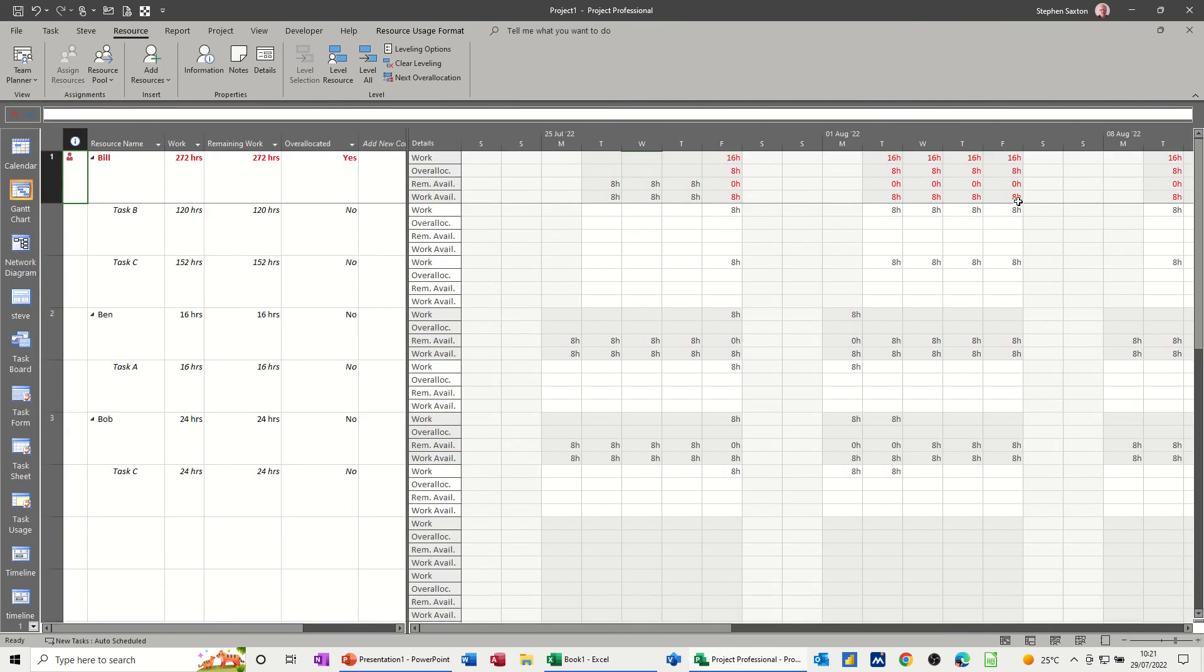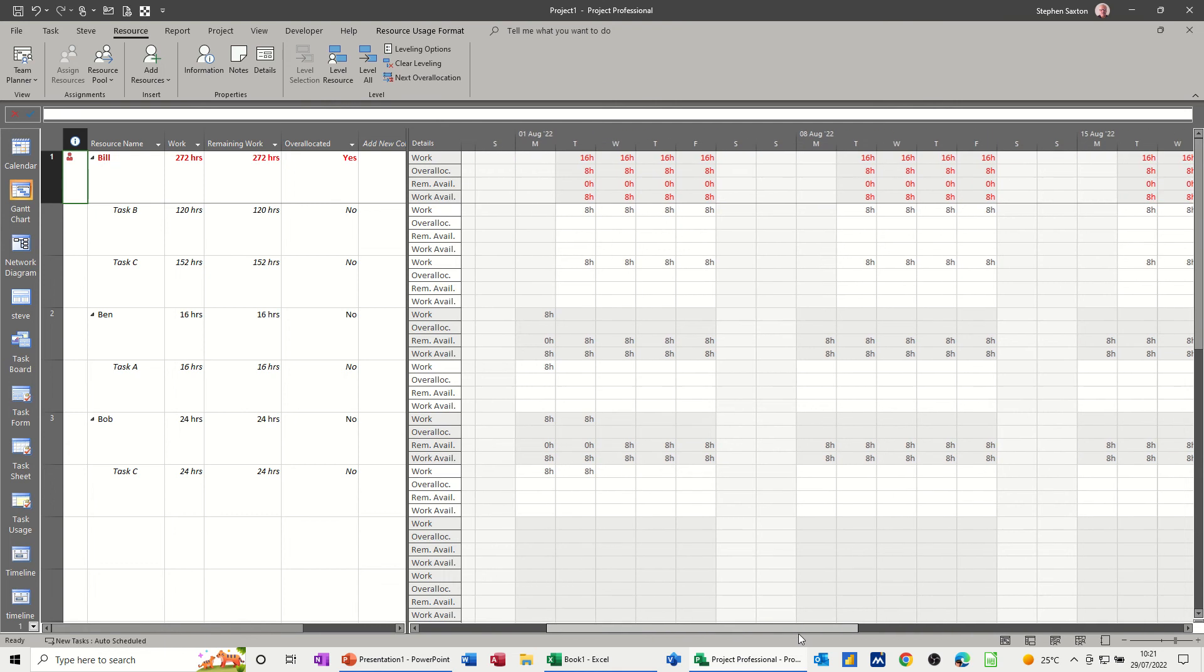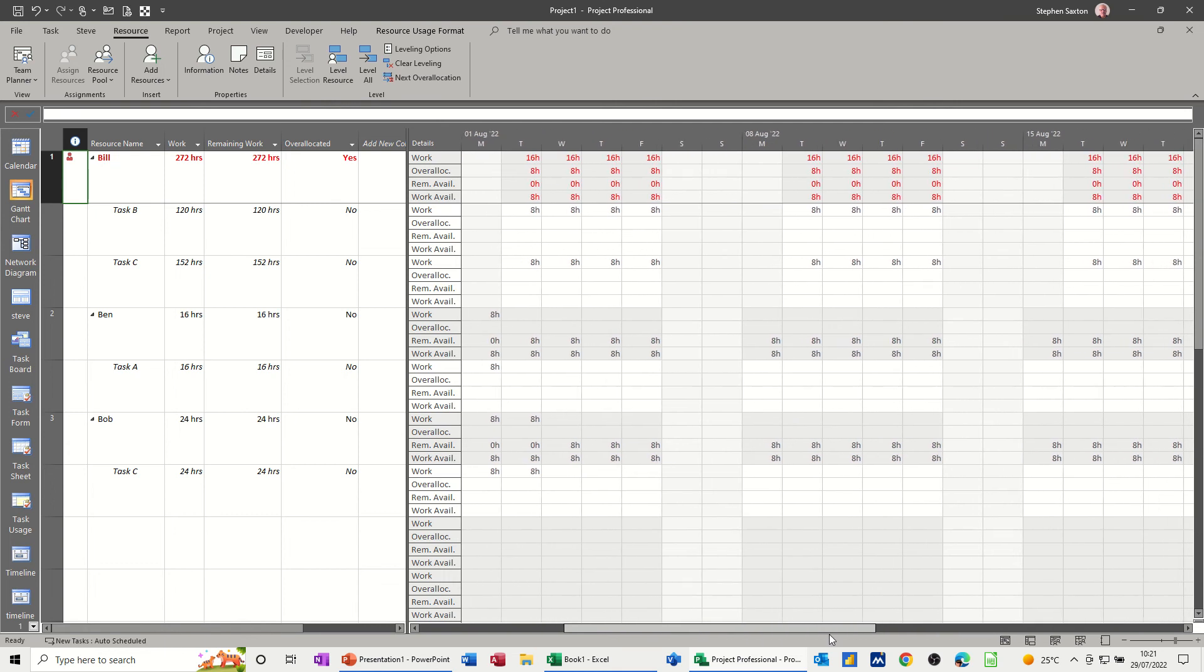Now you've got lots of red indications there saying that you are not doing great. So over-allocated, yes, it says there, and this is where it's over-allocated. So it's eight hours every day doubled up, basically. So like I said, that would now have to be sorted out.